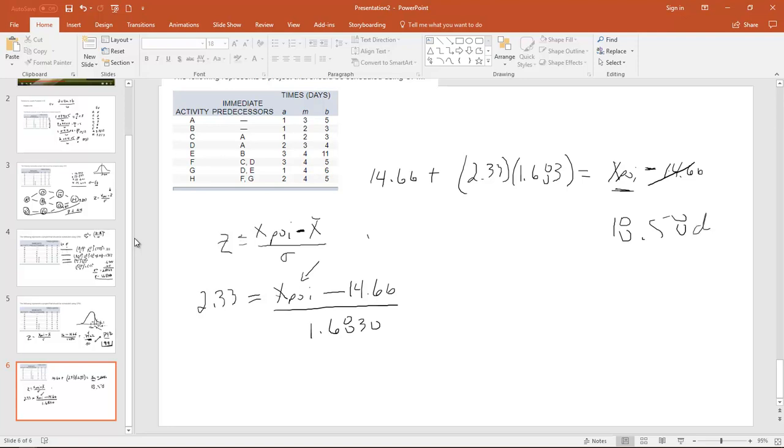18.58 days. Well, depending on what the contract looks like, usually you're not going to split hairs and talk about 0.58 days. You're going to round that and tell them 19 days. So in reality, you have a safety margin there. You'd have your 99% chance plus a little bit more, like half a day. Okay, 99 plus something. I have no idea, I'm just guessing. It's going to be something like 99.2%. We'd have to go back in the table and actually figure that out.